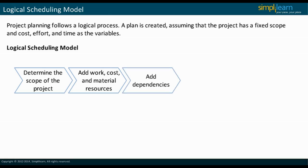Add dependencies between tasks. Then add the project schedule dates, such as the planned start date, expected duration for completing tasks, and project constraints.